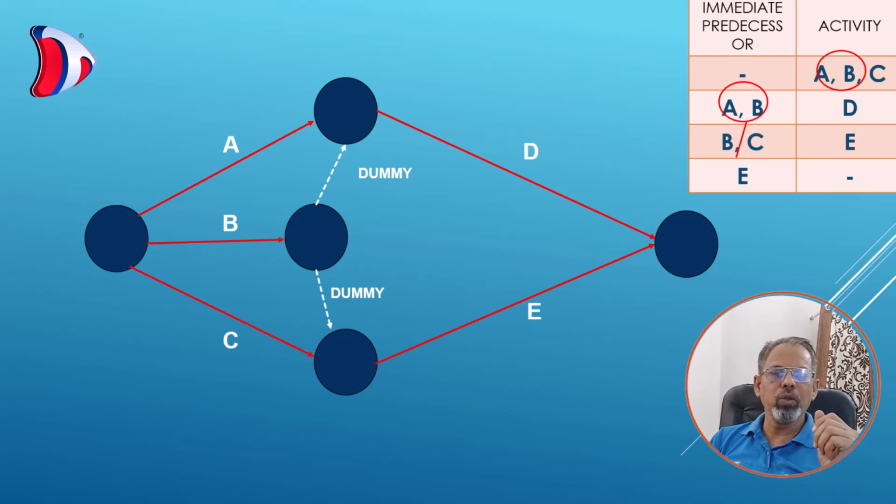Let me remind you that the dummy activities neither consume any time or resources, so they have no impact on the final duration of the project. We can understand the introduction of dummy activity with the help of another example. So let us move on.